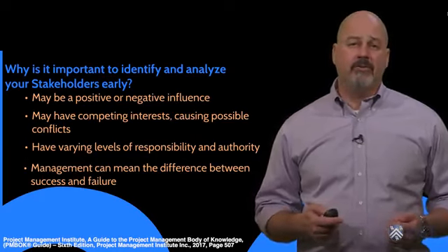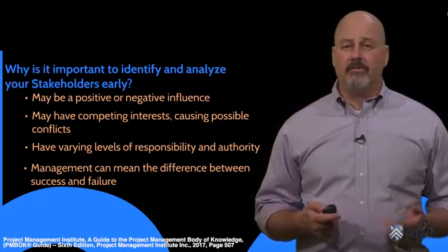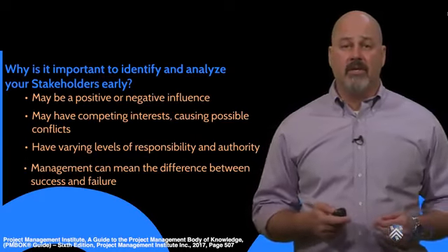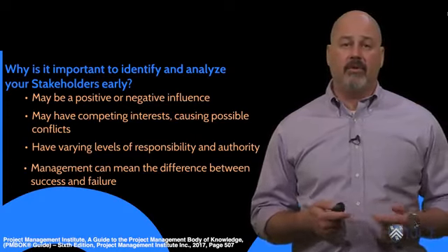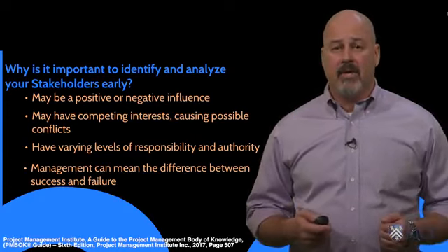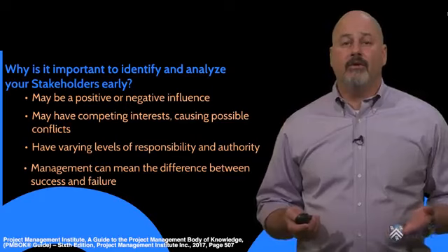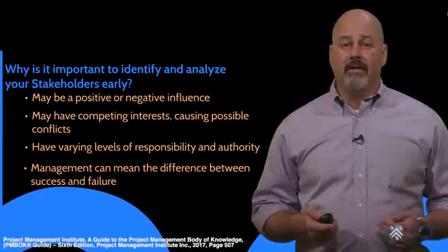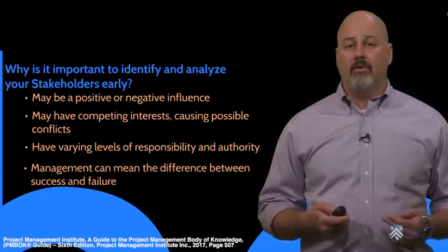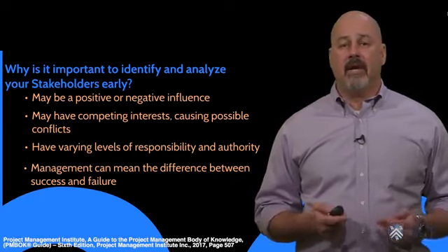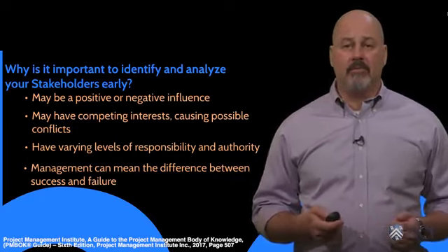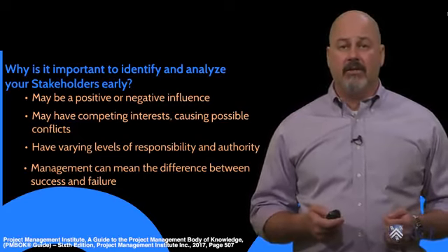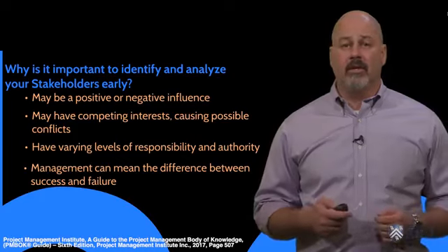For example, if you're trying to implement a new automated customer service mechanism for your company that answers the easiest and most asked questions, it may be wise to speak to the people currently doing that job in the call center. They may have a very negative view of what you're doing initially, but after speaking to them, they may become very supportive of it if it alleviates some of their workload when fully operational and allows them to handle the more complex problems. They are a stakeholder and need to be identified as such and managed appropriately.